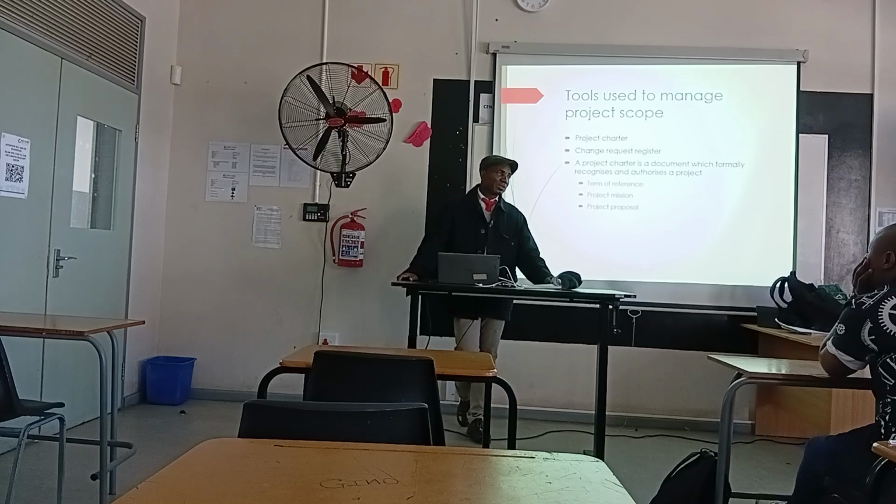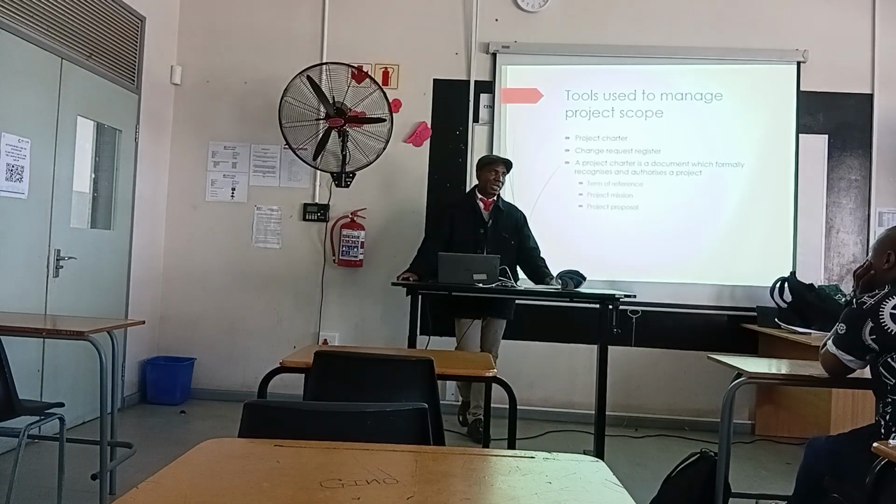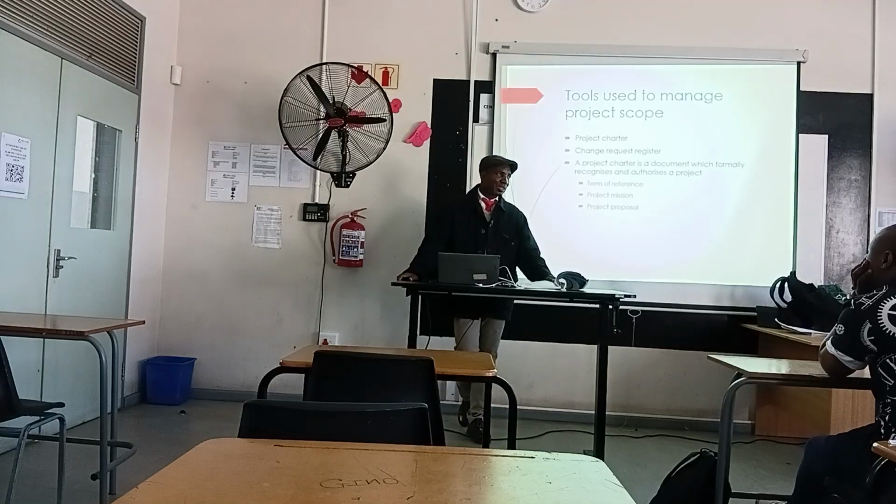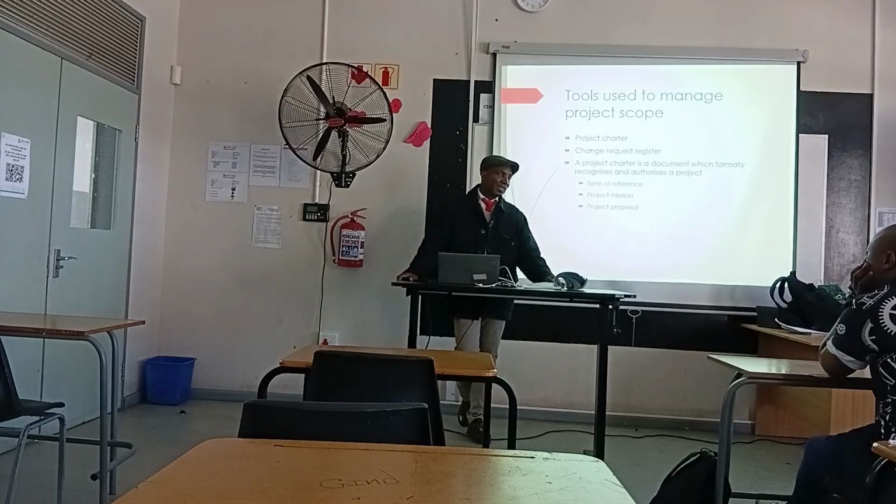Then the cost of whatever change you are requesting needs to be reflected, because one needs to do a kind of feasibility analysis to see the cost of what you are requesting against the benefits. And then it needs to be signed off.